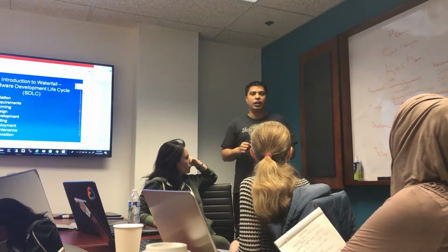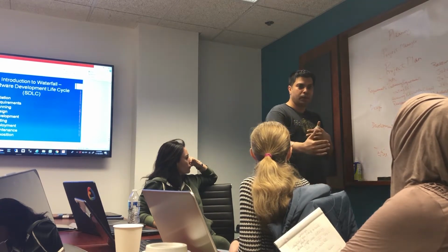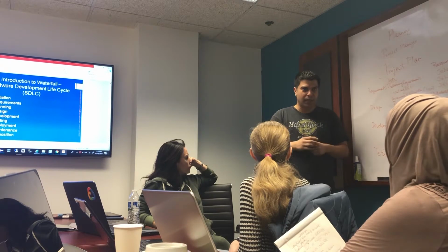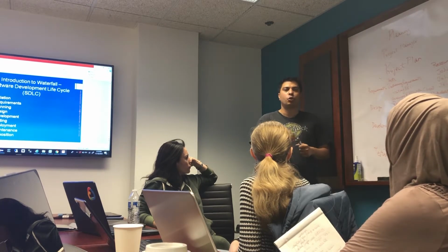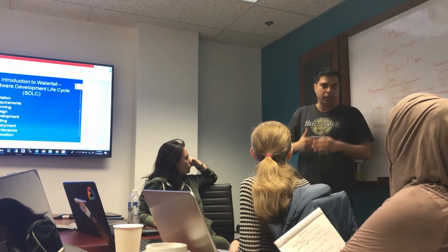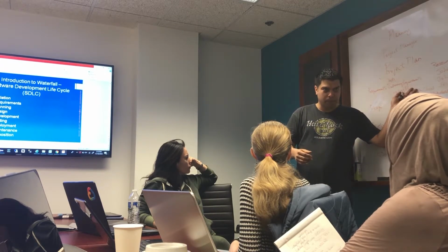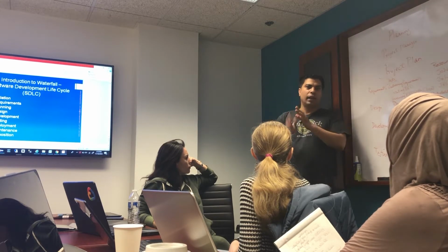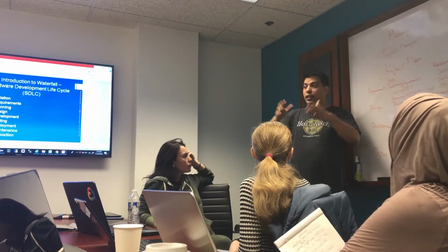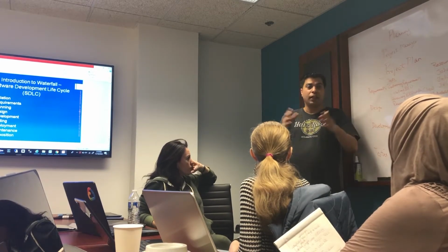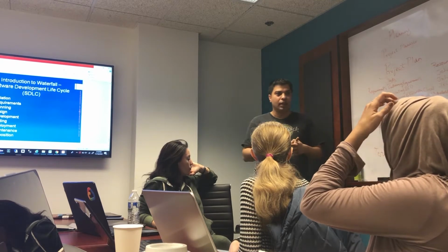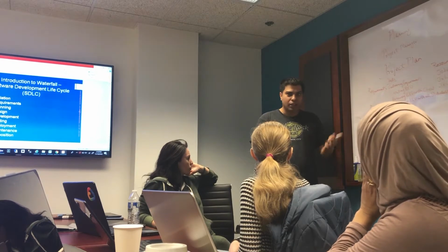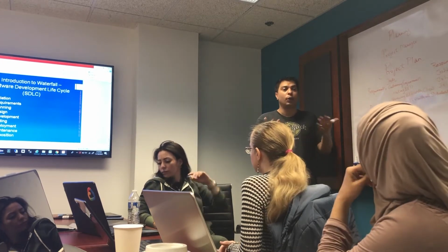The other thing the project manager has to do if they're experienced is keep a buffer. So let's say all this timeline comes to 10 months, for example. A project manager with experience should keep 2 or 3 months as a buffer without telling anybody in the team, right? So the deadline is set in 10 months, but the client is told it will be 13 months. Why? A lot of things can go wrong, okay? A lot of things can go wrong in a project. So you need some buffer. Now, how much you need depends on the experience of the project manager. They have run these projects, so they know what can go wrong.